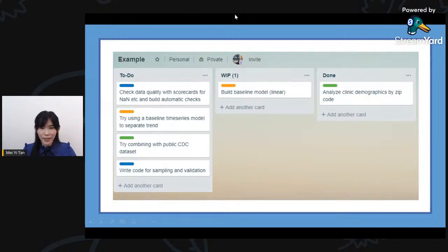Yeah, I saw the question asking how to plan a sprint and how big a module should be. So usually when we plan a sprint, we need to consider how big your modules are. So first you need to evaluate the scope that you need to focus on. And then of course for sprints, the duration is around 1 week to 4 weeks. Usually a sprint won't exceed 4 weeks. So within 1 week, what are the things that you can work on? Because usually when we work on data analytics projects, 1 week is too little because we don't have enough time to understand all the requirements and then start to gather all the data. So in that case, usually you need to allocate at least around 2 to 3 weeks.